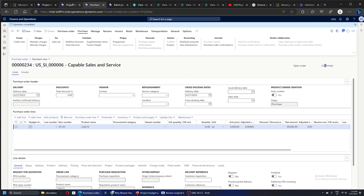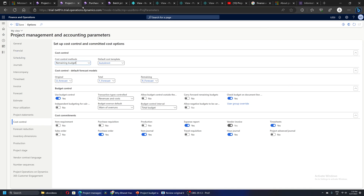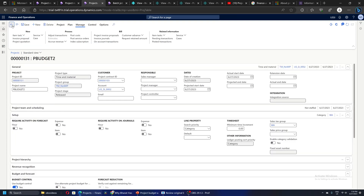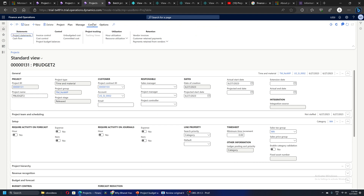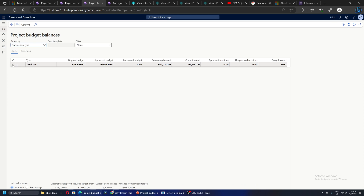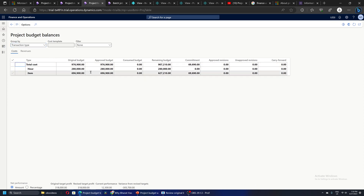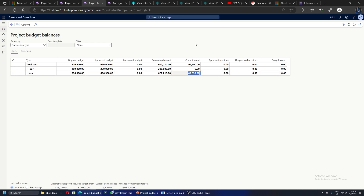The status is confirmed. Let's quickly go back to the project. On my project if I go to Control and look at the same project budget balances screen - against the item line we can see the total approved budget is 6,969,00 and there is a committed budget of 6,969,0. What has happened is since we created a purchase order against this project for 10 quantities, this cost has been committed since that PO is approved. This is a very interesting feature - and when we actually invoice the purchase order, this commitment cost will move to consumed budget.